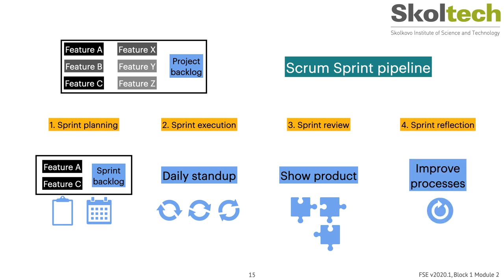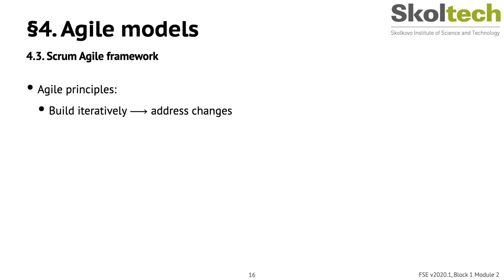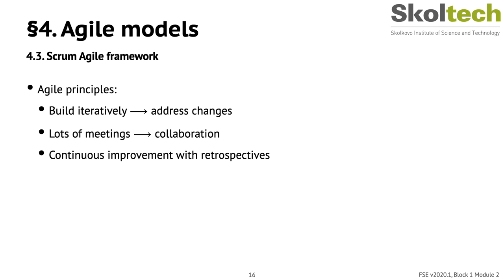Finished work accumulates over time into a more complete solution. An internal meeting called the sprint retrospective also occurs, where the team talks about the process and how they can be more effective, productive, or obtain more satisfaction from their work. You can see how Scrum contributes to implementing agile principles: by building iteratively, the team addresses changes in requirements and customer needs. Lots of meetings facilitate collaboration between team members, the Product Owner, and the Scrum Master. The framework encourages continuous improvement through retrospective meetings.